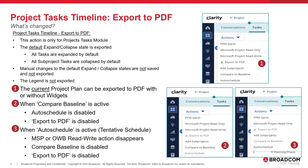This action is enabled for generating a PDF for the current project plan. When the Compare Baseline action is active, both the Auto Schedule and Export to PDF actions are disabled.